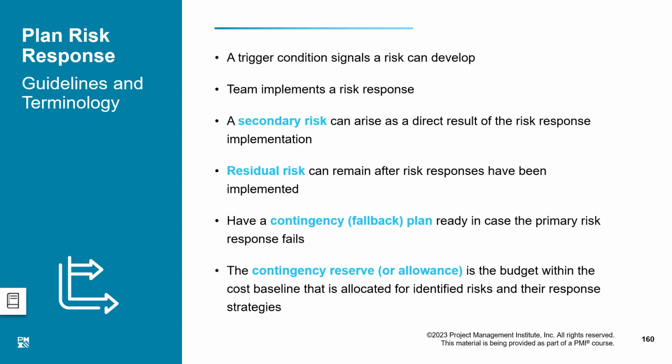When a risk occurs, we get into issue management, and the contingency plan is the alternate plan which the planning people have already created in case any such situation occurs, such as the internet being down. Whatever is left over is the residual risk, and whatever we do in the fallback plan is when the risk has become an issue. As far as reserves are concerned, we have already discussed that contingency reserves could be amended or added throughout the life cycle of the project.